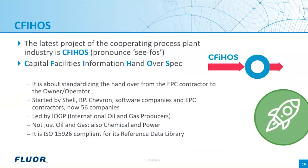The latest project of the cooperating process plant industry is CFIHOS — Capital Facilities Information Handover Specification. It is about standardizing the handover from the EPC contractor to the owner-operator. The end result is a specification which can be used as part of the contract with EPC contractors. The handover data is to be loaded into a relational database, and the handover itself is by means of comma-separated value files. It was started seven years ago by Shell, BP, Chevron, software companies, and EPC contractors, but now has 56 companies participating.